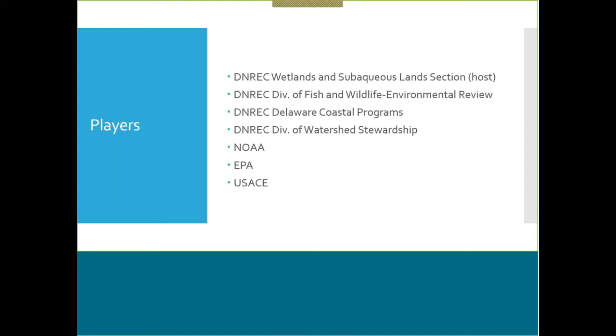As he mentioned, a lot of the Living Shorelines projects can be accomplished with a nationwide permit that DCMP has already issued blanket concurrence for. So in that case, the project will not be required to submit an application for federal consistency. However, if it's in a critical resource water, or if it ends up needing an individual permit, Section 10 or Section 404, then we will end up reviewing that project. And we'd like to provide information on how they can submit their application form for federal consistency and what would be required during the meeting.